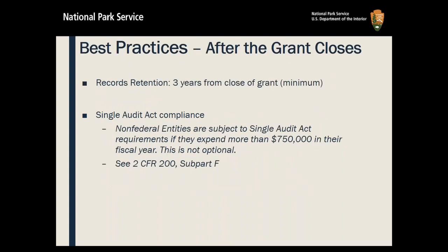Record retention. Best practices after the grant closes. I apologize. Record retention is 3 years for a closed grant, minimum. Single Audit Act compliance: non-federal entities are subject to Single Audit Act requirements if they expend more than $750,000 in their fiscal year. This is not optional. See 2 CFR 200 subpart F.